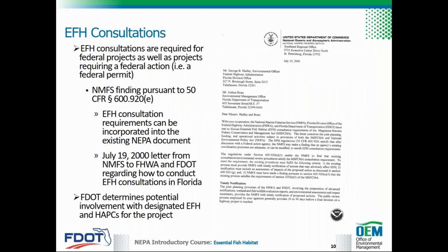Essential fish habitat consultations are required for federal projects as well as projects requiring a federal action, such as a federal permit. EFH consultation requirements are subject to a NMFS finding pursuant to 50 CFR section 600.920(e). EFH consultation requirements can be incorporated into the existing NEPA document, in this case through the Project Development and